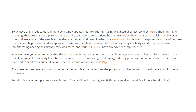However, everyone understands that the top 10 is an input, not an output, to the planning process. What can be achieved in the next PI is subject to the capability limitations, dependencies, and knowledge that emerge during planning.